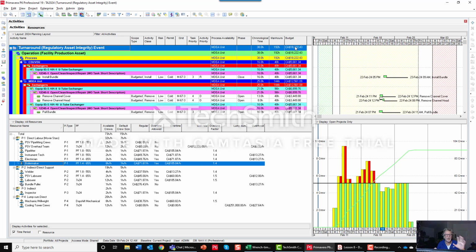And I'm always looking for high earn, low burn. Okay, high earn, low burn. Not just cash burn, but float burn. So you might see my float here. This float is very expensive. And if somebody's burning this float, sooner or later I'm going to crash and collide with a milestone or collide with something, this is going to cost me money. And so I want to keep an eye on how much float am I burning, how much am I paying to earn, and what is my performance of my workforce.